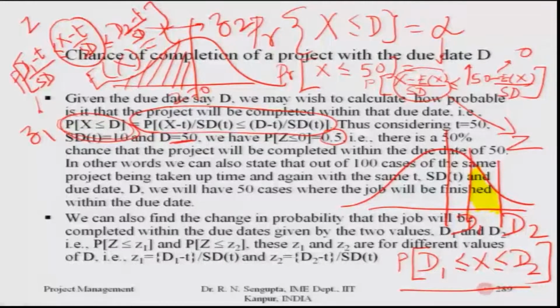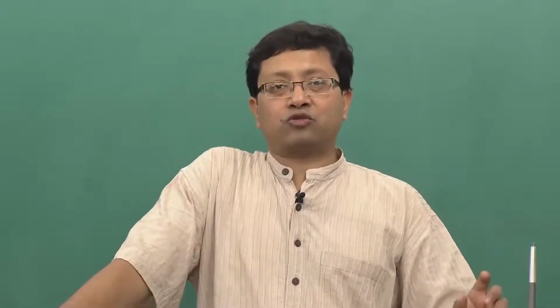Based on that, I can find out the probability that I am able to deliver, because based on that I will recalculate my overall budget and take a decision whether I can delay, or whether it is best to finish off that job before the D2 period using some extra man, material, giving overtime, trying to take help of other vendors, trying to pay them an extra amount of money,